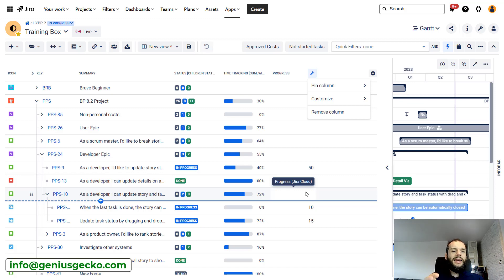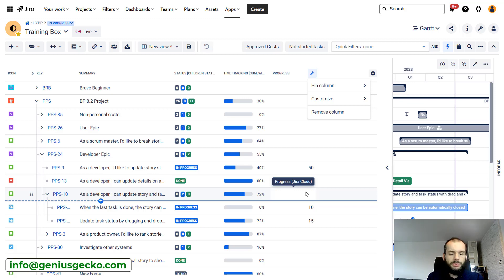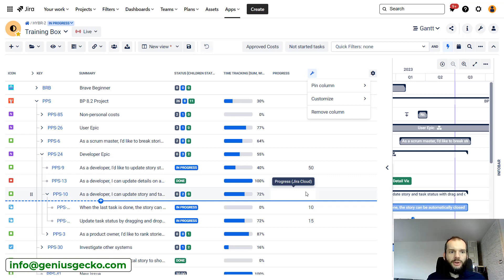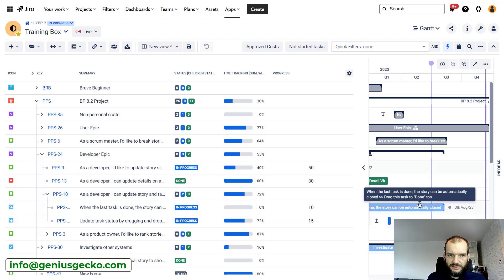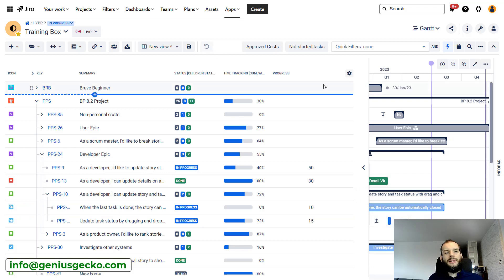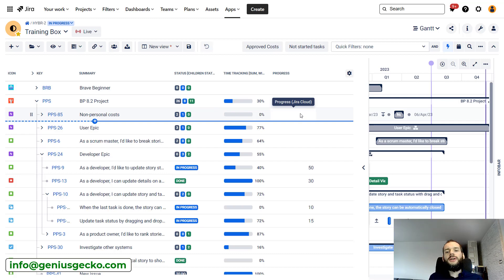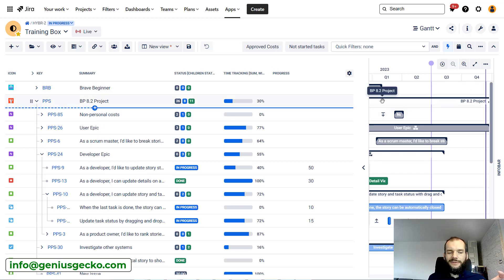Something we are often asked is whether Jira and Big Picture can provide progress calculated the same way as Microsoft Project, since many organizations are used to that approach and want to stick to the same logic when migrating. This is possible with the right script: the progress on the parent level can be weighted, and in Microsoft Project it is weighted based on the length of tasks. It requires a bit more work, but if you want very specific calculation logic, the custom field with some scripting can do the job.